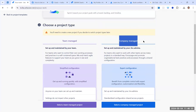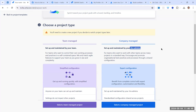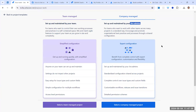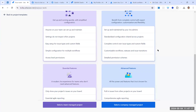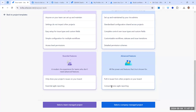Team-managed projects are used by less than 5% of organizations. What is most commonly used is Company Managed, where the Jira admin sets up and maintains everything. We need to provide the project name and project key. Company Managed has all standard configurations, you can pull issues from other projects for dependencies, and all agile reports are available.